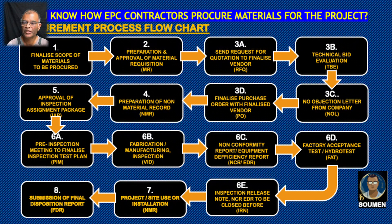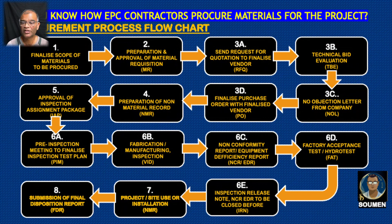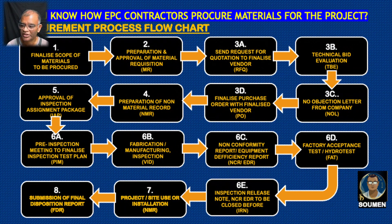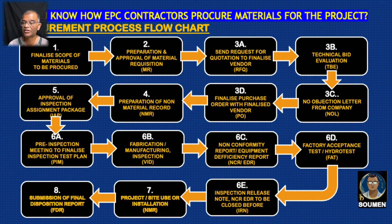After IAP approval, the pre-inspection meeting is arranged. Participants include the vendor, the inspection department from the company (VID), and the contractor representative. In the pre-inspection meeting, the Inspection Test Plan (ITP) is finalized. Once the ITP is ready, the vendor starts procuring their raw materials to fabricate or manufacture the equipment. During manufacturing, vendor inspectors from the contractor and the VID representative are present periodically, based on the level and restrictions of the inspection.